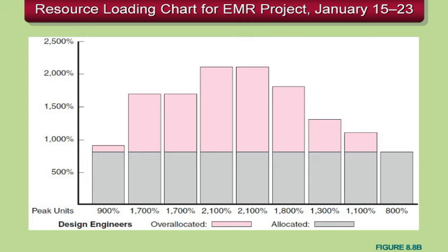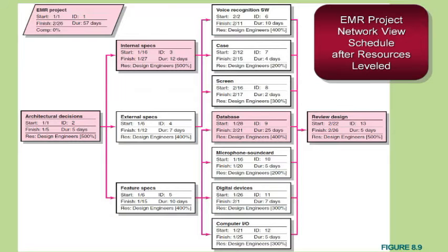You can see that we have 8 total. During that first period of time, we're overallocated by 1 engineer. At some point, we're overallocated by over double of what we need. Within Microsoft Project, if we tell it what our resource limitations are, and we identify what the resource requirements are, it will tell you if we're overallocated.